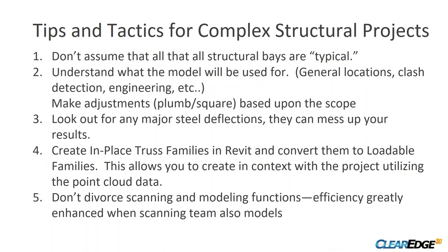As mentioned before, don't assume that all structural bays are the same. I've done enough structural engineering to know that if they were that easy, you could hire anybody to do this, and they would come up with a typical facility, and then you'd have all sorts of trouble with these additional things like cranes and extra loads and mechanical equipment you'd have to throw in there. So there's always that variation that you have to look out for. You can't assume that everything is going to be exactly the same. So be very careful with the pattern extraction.